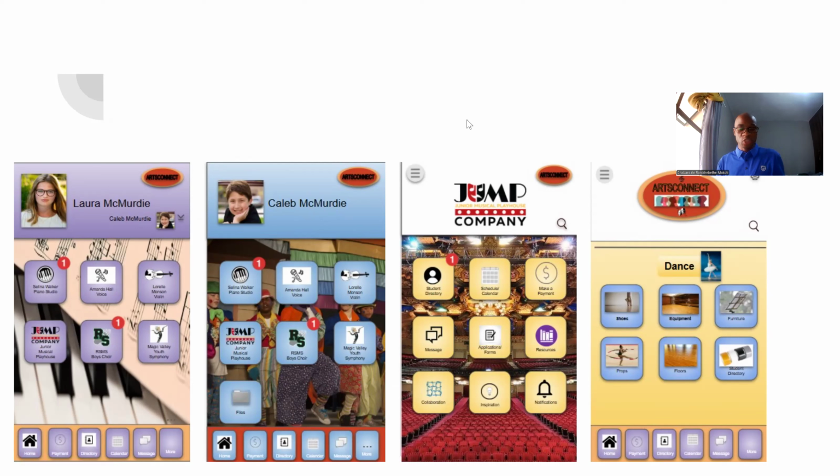All right, now let me share with you in conclusion some of the things that we have learned throughout. I feel that what went well with our team was that we had a lot of communication. Our team communicated a lot to make sure that we met goals and the sprint was a success. One of the issues that we came across was that we kind of had a trial and error approach to our sprints, which meant that we'd discover some things later on in the middle of the sprint. And so the developers and the product owner would have to find ways to incorporate those without jeopardizing or changing the sprint goal.